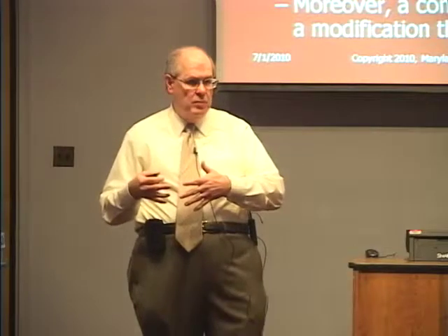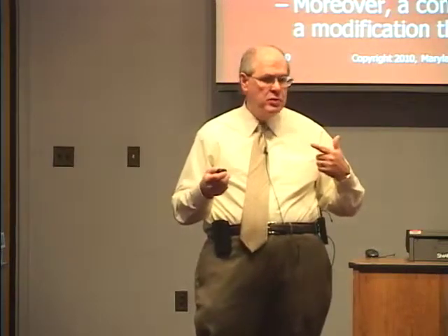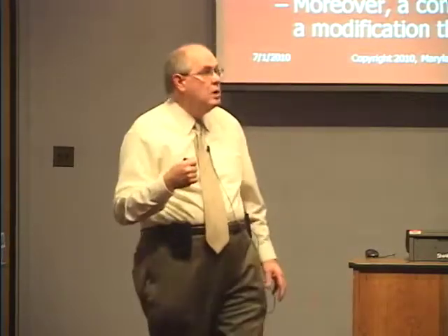So you should always have the default that in the event that we can't come to a meeting of the minds, we're going to tell you. Now, whether they file a claim and say that we picked the wrong one, they still can do that, it may get to a claim, but we should always have the ability to have the upper hand via that clause or via simply a change order.